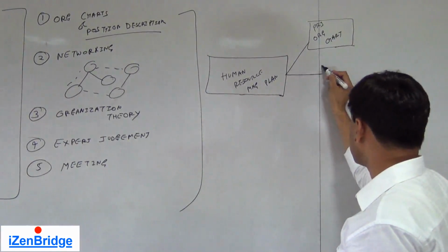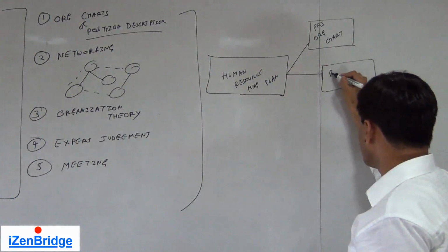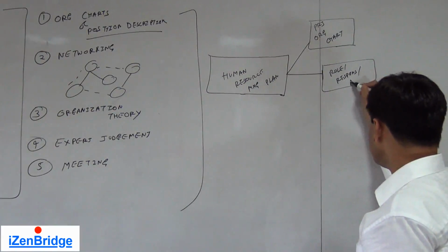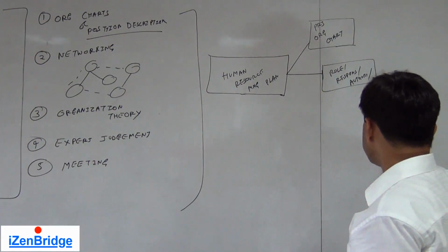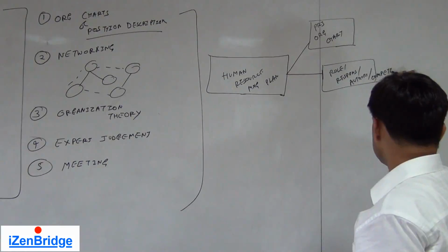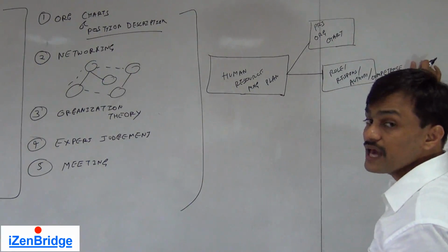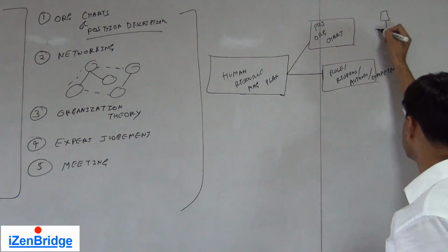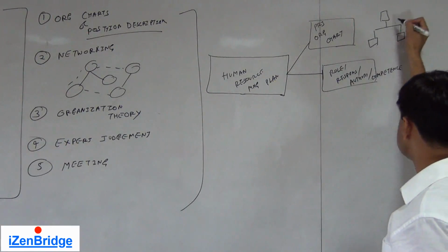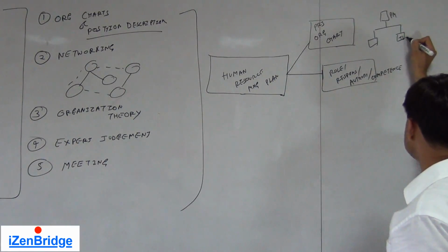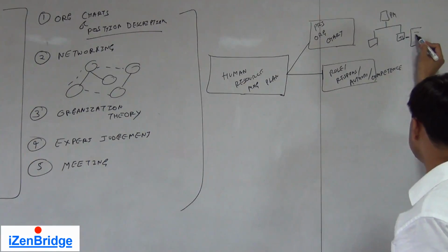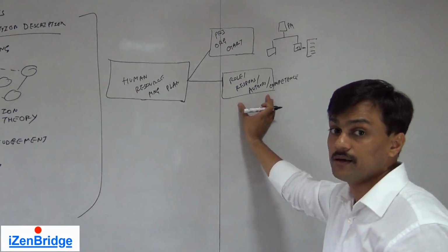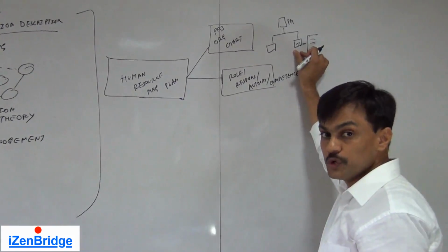We should also get role, responsibility, authority, and competence details at individual levels. So whatever comes in this organization chart, which may look like a hierarchical diagram where the project manager is sitting on top, if we have a position here, this position should be further elaborated in a textual format by telling what role, responsibility, authority and competence this particular node should have.